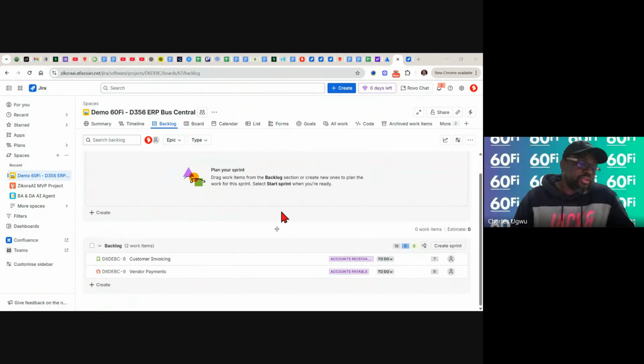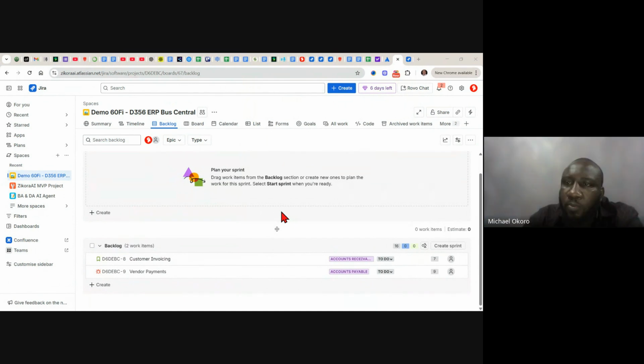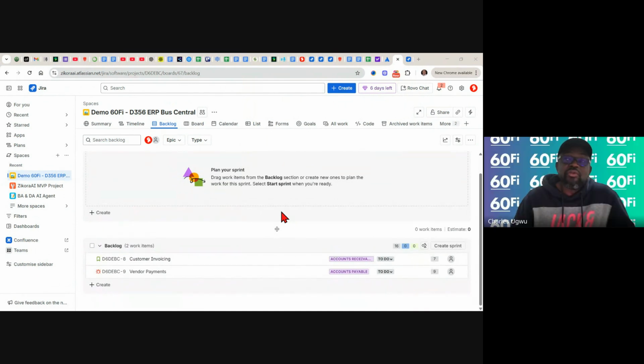Secondly, the work breakdown structure I gave you is a template. In a template, you select the items that align with your project. You don't copy everything verbatim. In this case, we don't need wireframe because this is a software configuration project.